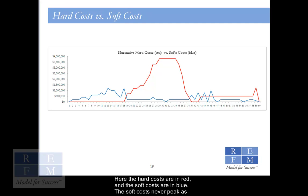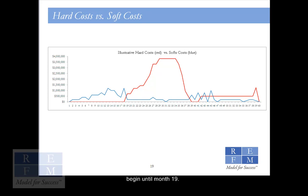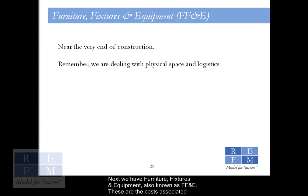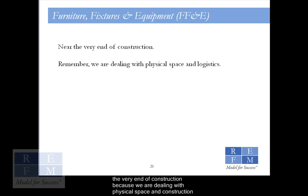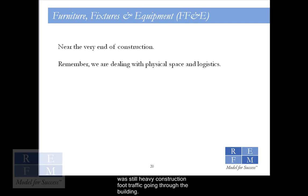The soft costs never peak as high as the hard costs do, and they begin in month one, whereas the hard costs don't begin until month 19. Next, we have furniture, fixtures, and equipment, also known as FF&E. These are the costs associated with fitting out the lobby of the building with millwork and art, and furnishing the fitness center. These costs come at the very end of construction because these items would be at risk of being damaged if they were installed while there was still heavy construction foot traffic going through the building.